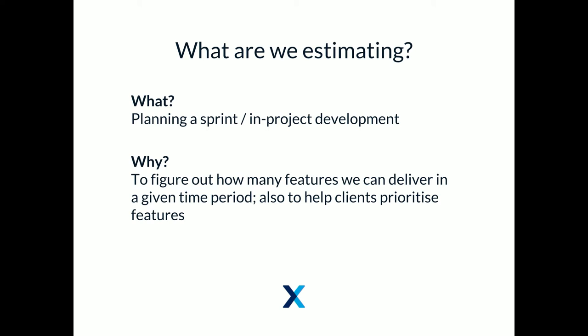The next one is once you've won the project, you have to actually estimate the broken down features. In this case, the project's been approved, and you just need to basically figure out how much you can get done in a single sprint. So you break down to stories, and you estimate those. We try to do relative size for those, but you have a lot more information there. It's a lot more specific. But the other thing to note here is it's usually not critical to be accurate to the hour on each ticket, because if you have 100 tickets in a sprint, some will go over, some will go under. We don't really labor over this too much.